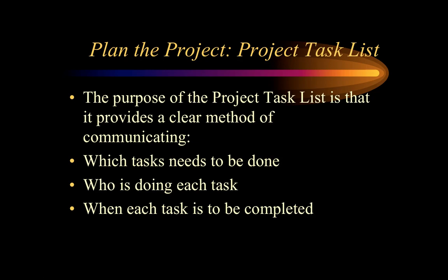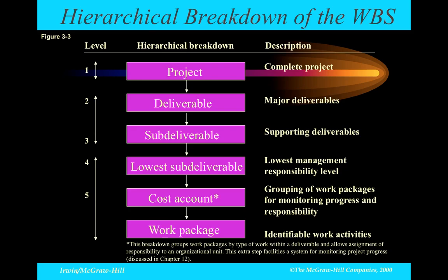All right? And in terms of the task list, you can see the purpose of a task list is to state exactly what needs to be done, how long it should take, and who should do it, etc. One of the ways to identify a task list is through a technique called a work breakdown structure, where essentially we take a project and break it down into multiple levels. And here's an example of a hierarchical breakdown of a project.